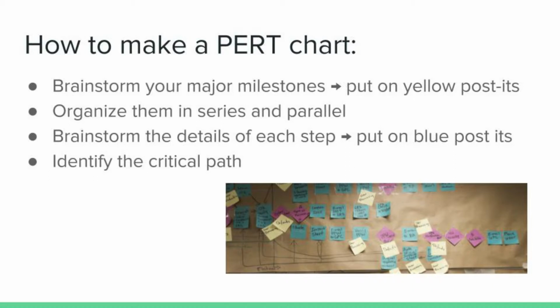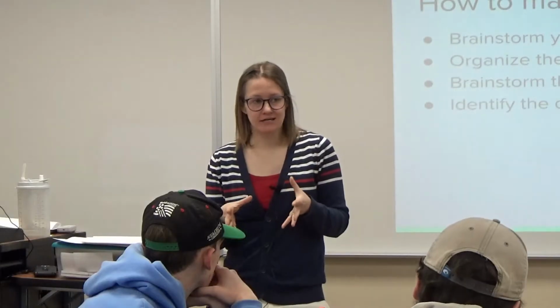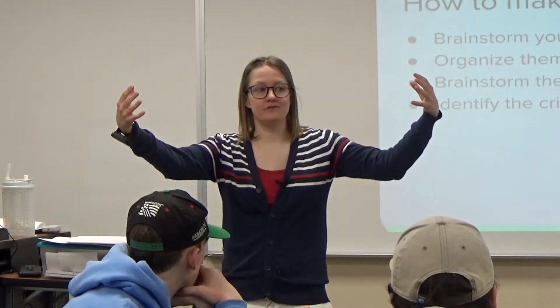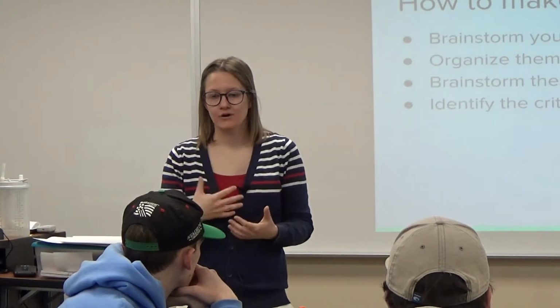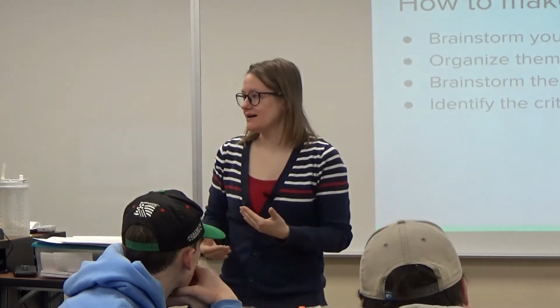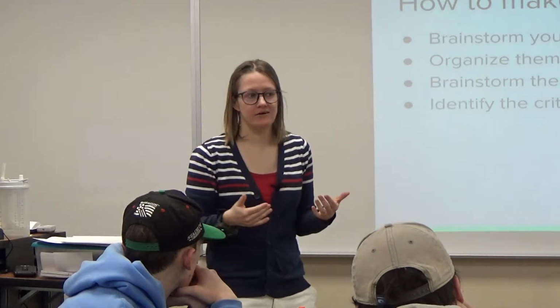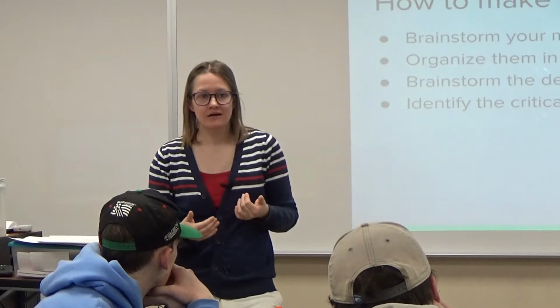So if you got them on Post-its or some other thing that makes it easy to move things around, you can then start drawing arrows in between them and figure out what your PERT chart looks like. And that's high level. And then you think about each of those specific tasks and what the subtasks of that are. So think in more detail about what all occurs in there.